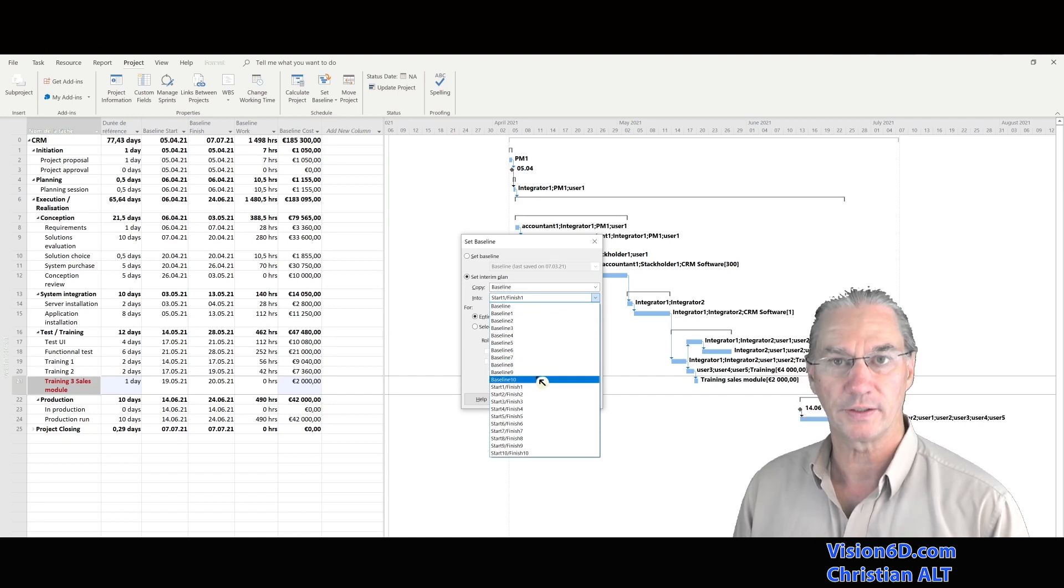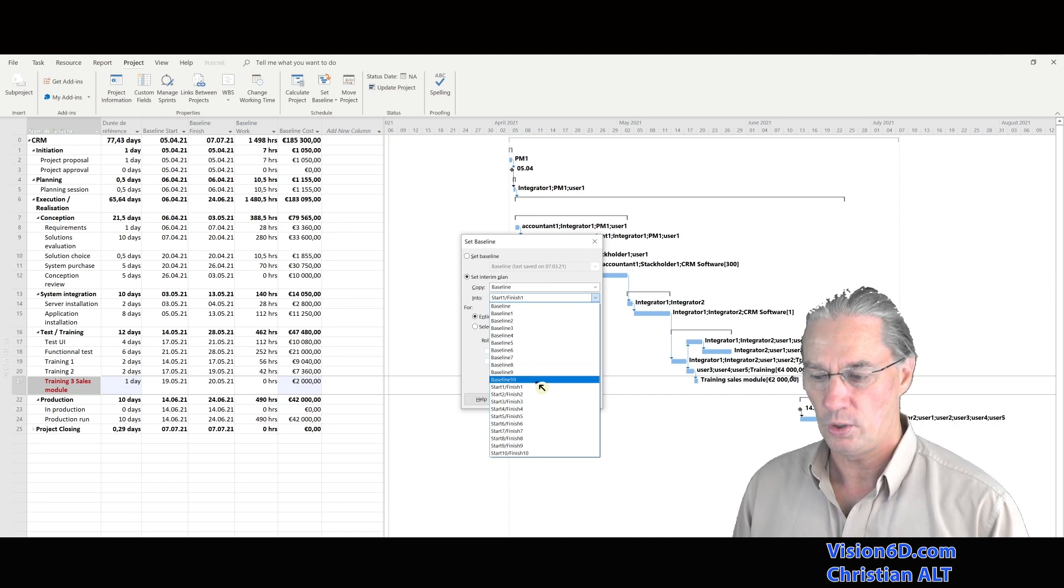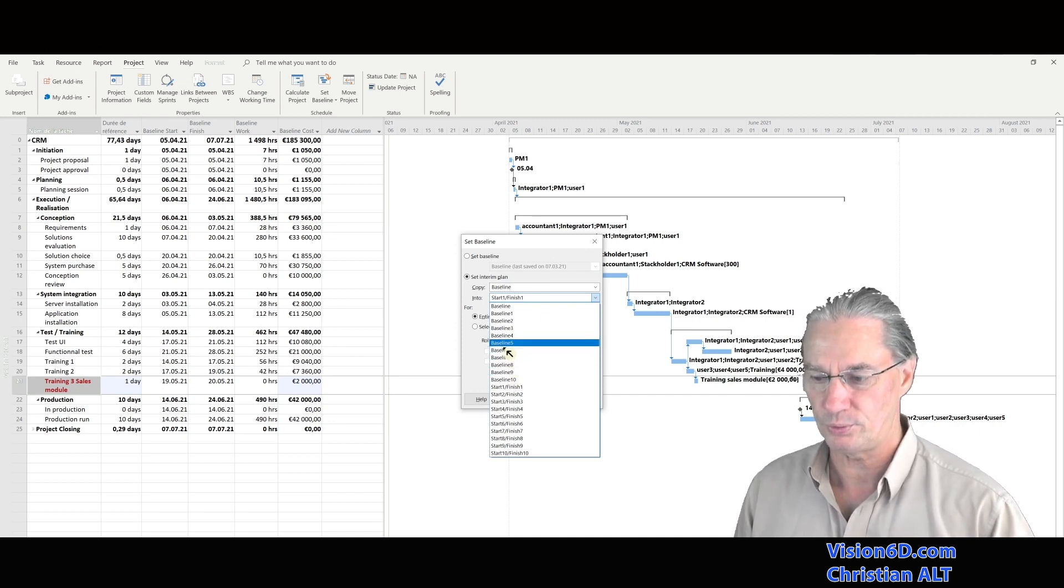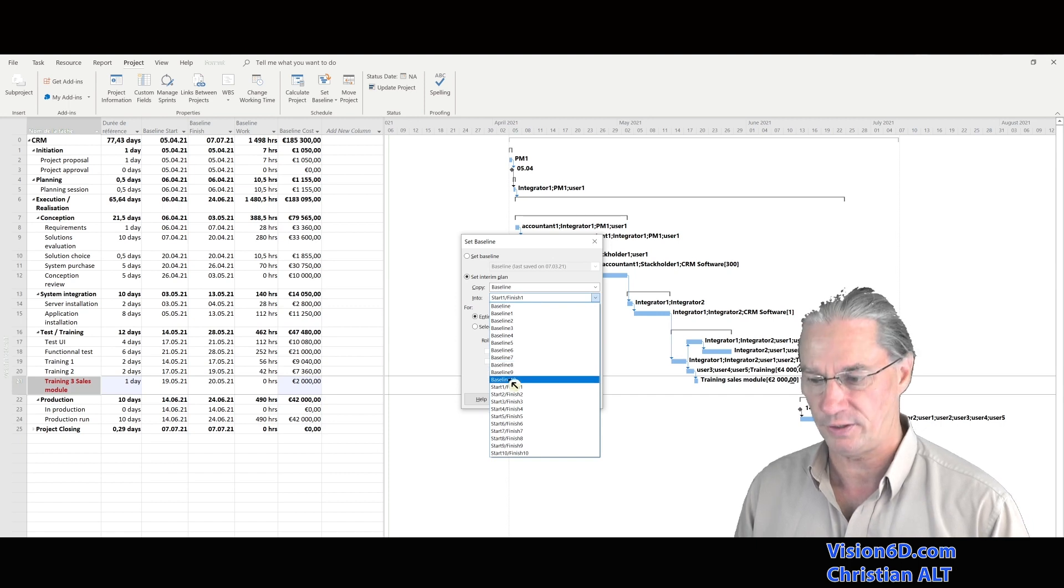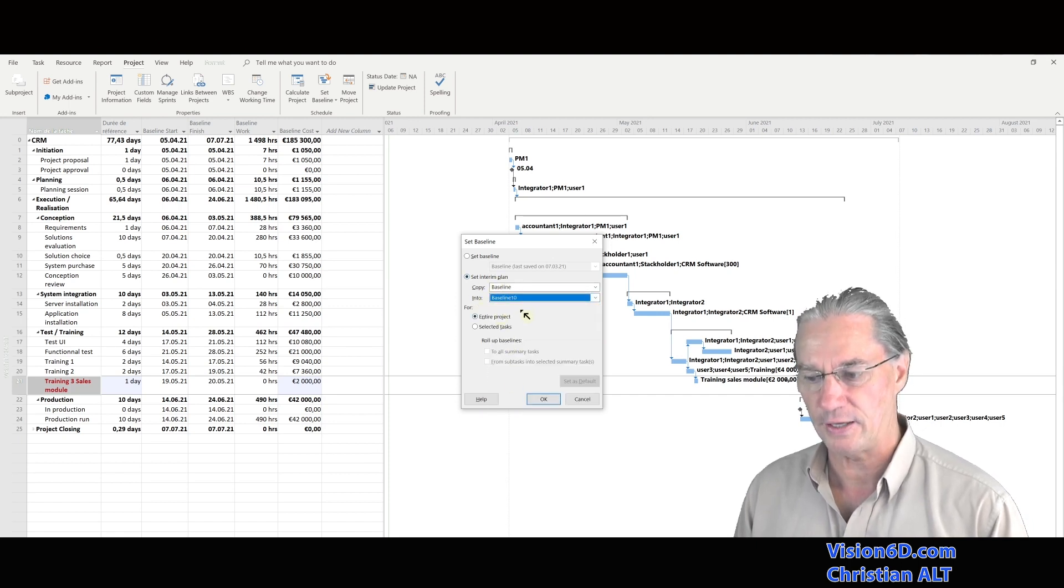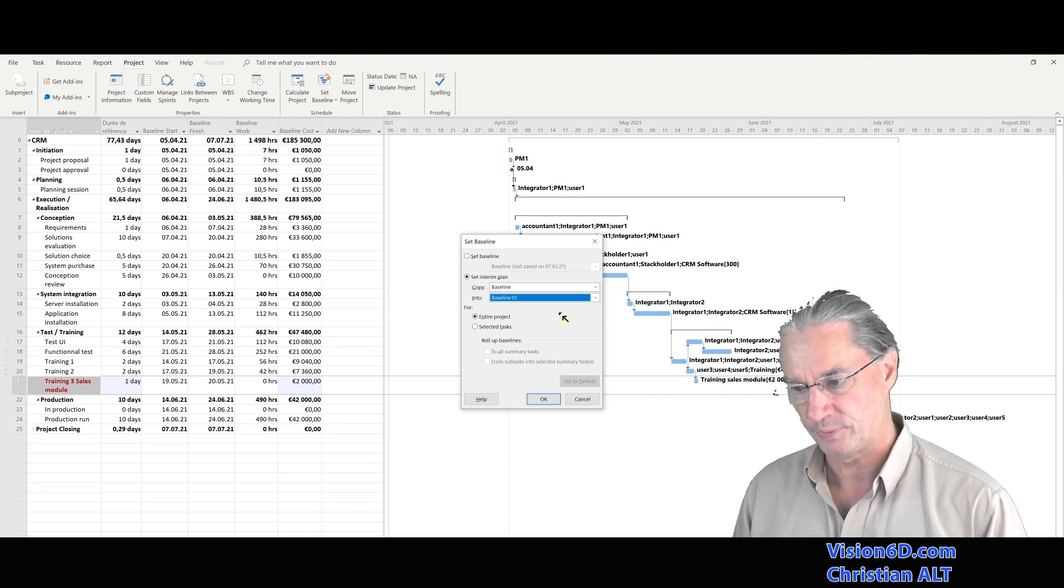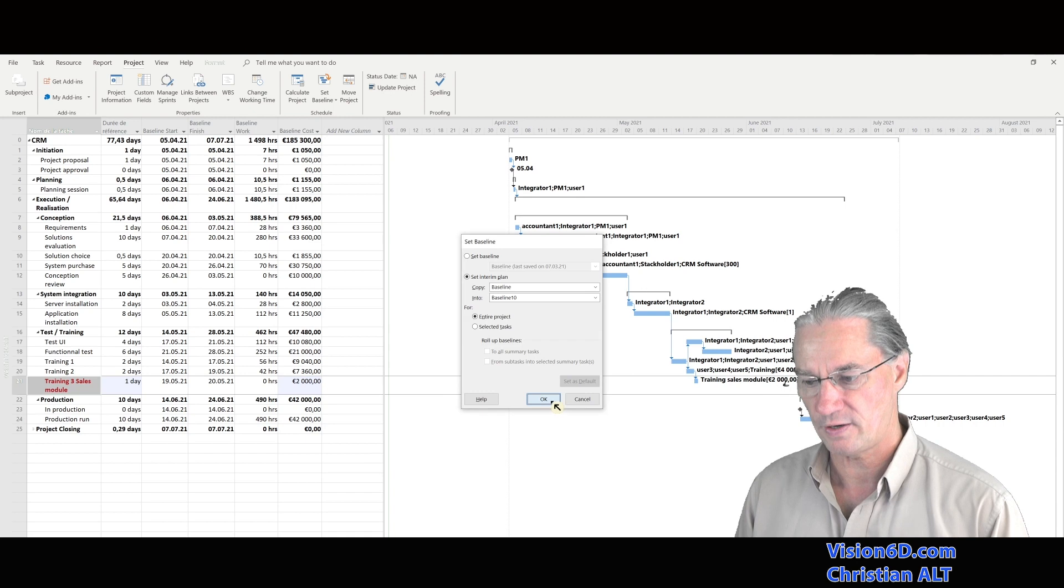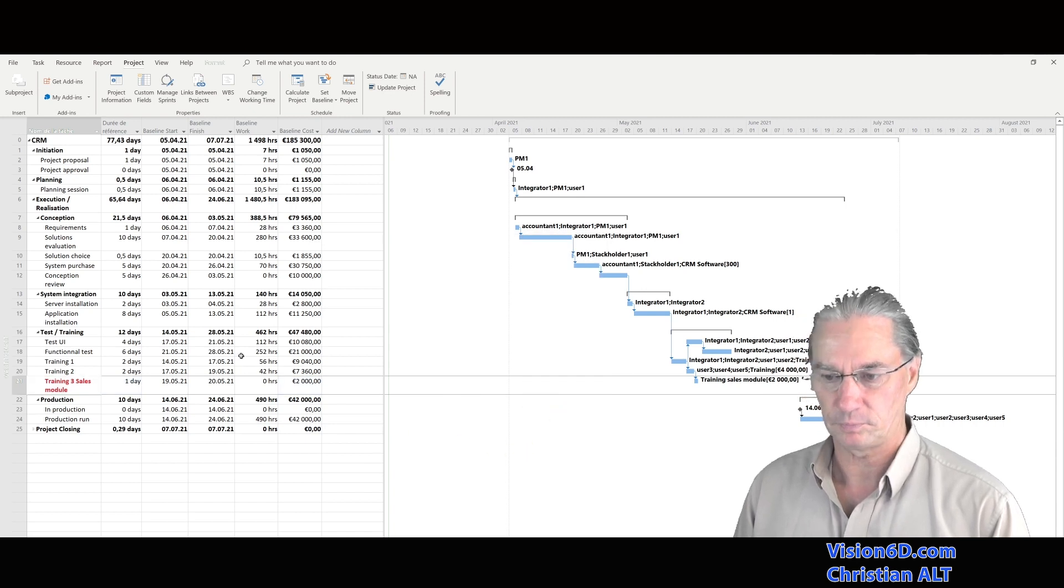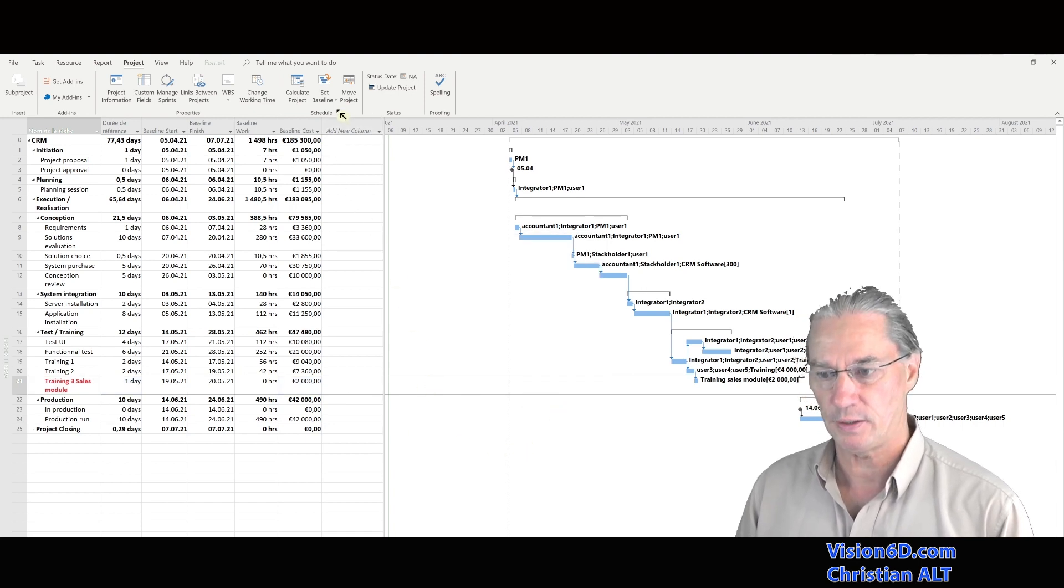You could say that historically, you will go counterwise from 10 up to the nearest you can find. So for this, I would admit that I would like to copy baseline into baseline 10. And that's it. I just have to say okay here, and nothing changed in our baseline.